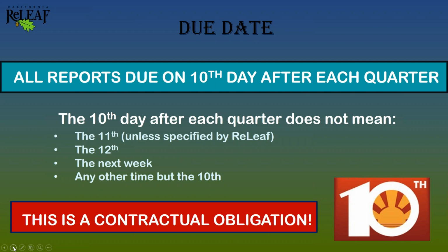However simplistic this may seem, this is a piece that we really need to focus on a bit, which is the due date. And there has been some challenge in this for the new grantees. I think I've mentioned to you in the forms that I've sent you that the quarterly reports are due on the 10th day after each quarter. That'll be April 10th for everyone that's on the webinar right now.